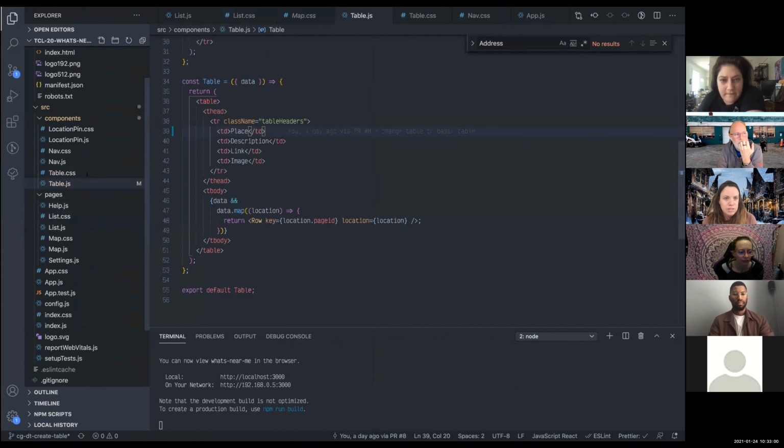Level of polish. I really like this example where you might start off with just entering a date in a field, but that's kind of error prone and not maybe the greatest experience. Although a date picker is usually less accessible, you might add a date picker later as an enhancement. So you can again get the value out there and then make it a better experience later. And then steps or skeletons. We actually did this in the first story: let's just add basic routing and views. And then we're going to add stuff to those in later stories. So that's an example of that.